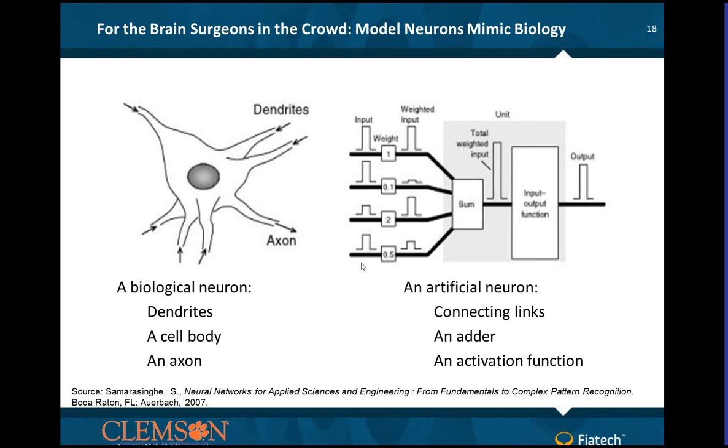And our prediction and everything we're doing is, given all of these data points about was it on time or not when the PO is issued, was it on time or not when it was at the shipping dock, was it on time or not when it was being staged, etc. We want to use as many predictors as we can to figure out if we can estimate or predict with what certainty it will be on time at the job site. So our focus here is on the right side.